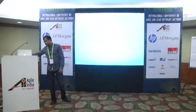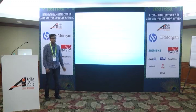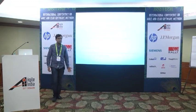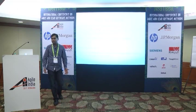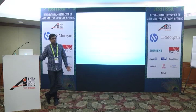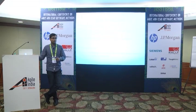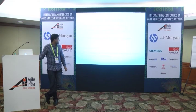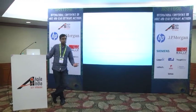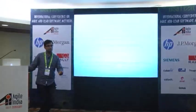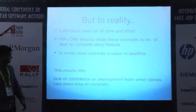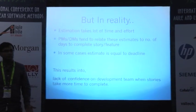But is that really the case? In reality, estimation takes so much time and effort. I've seen situations where people spend one or two days just estimating the product backlog. Then there's a tendency for project managers and delivery managers to relate story points to number of days, asking developers: 'You said it's a one-pointer — why isn't it done in two days?' In some cases it becomes like a deadline. What happens is there's a lack of confidence in the development team when a smaller story takes more time.